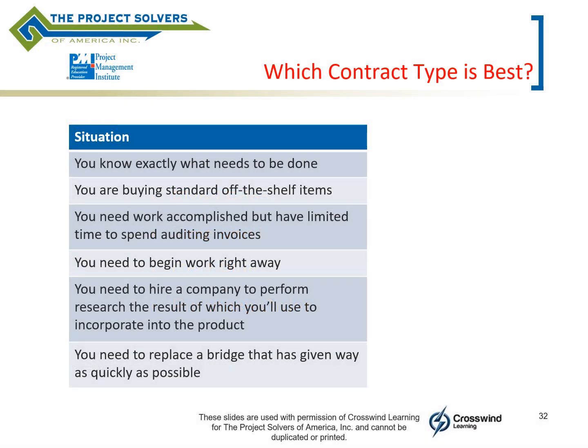And here's a little exercise. If you know exactly what needs to be done, what type of contract would be best of the different main contract types? So it should be fixed price because you can specify the scope of work precisely. Therefore, fixed price would be okay. People can estimate and give realistic estimates.